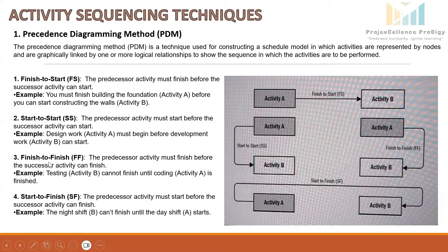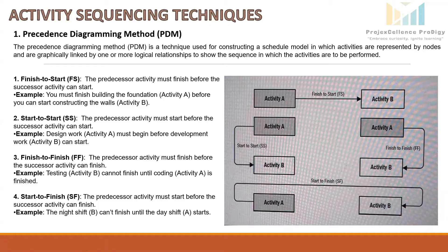The third relationship is Finish to Finish, FF. The predecessor activity must finish before the successor activity can finish. For a software project, the testing activity B can only finish once the coding activity A is finished. Another example: quality inspection, which is activity B, cannot finish until the complete painting, activity A, is finished.